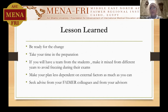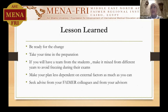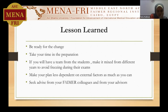If you have a team from the students, mix it from different levels and different years to avoid freezing during their exams — that was one of the obstacles I faced during the preparation of my pilot video. The students were all from year two and we had to pause for two weeks before and during the exams period. Make your plan less dependent on external factors as much as you can — this was advice from my advisor, Prof. Hany Wahib — so you have control over tools and can make modifications without obstacles.